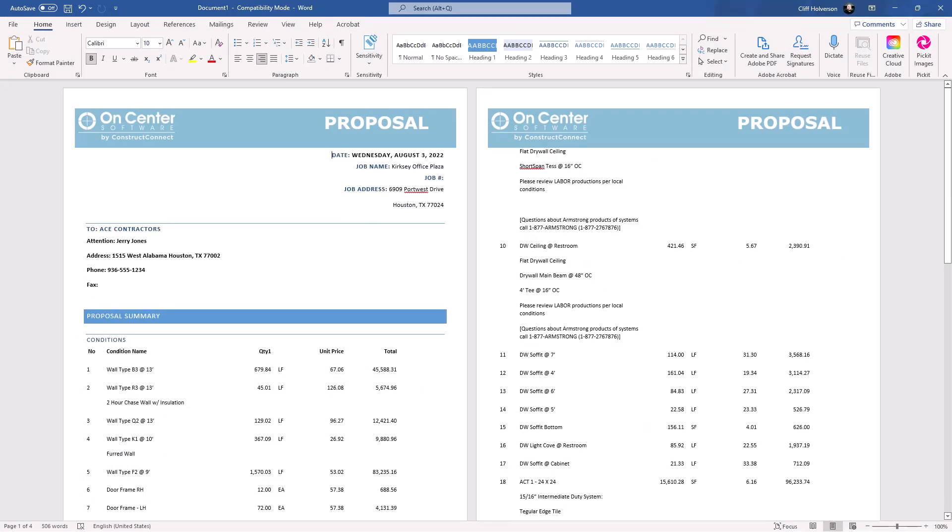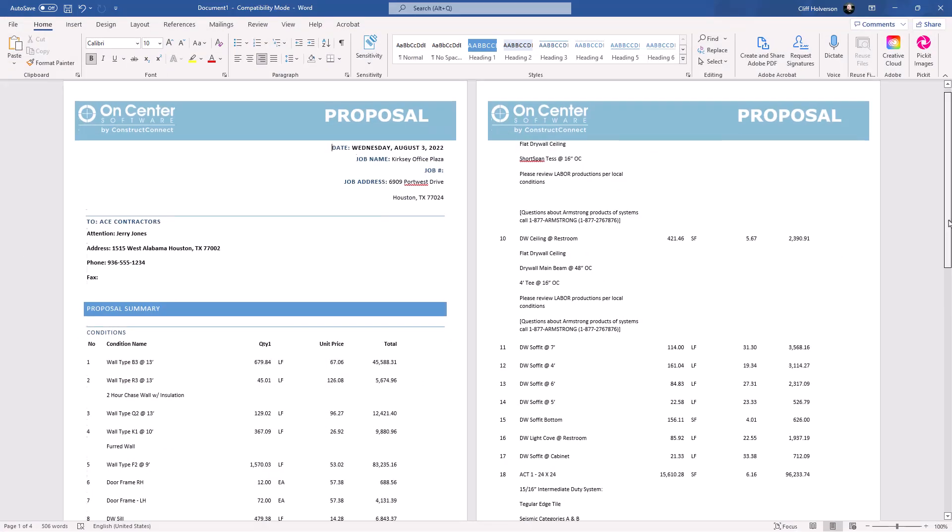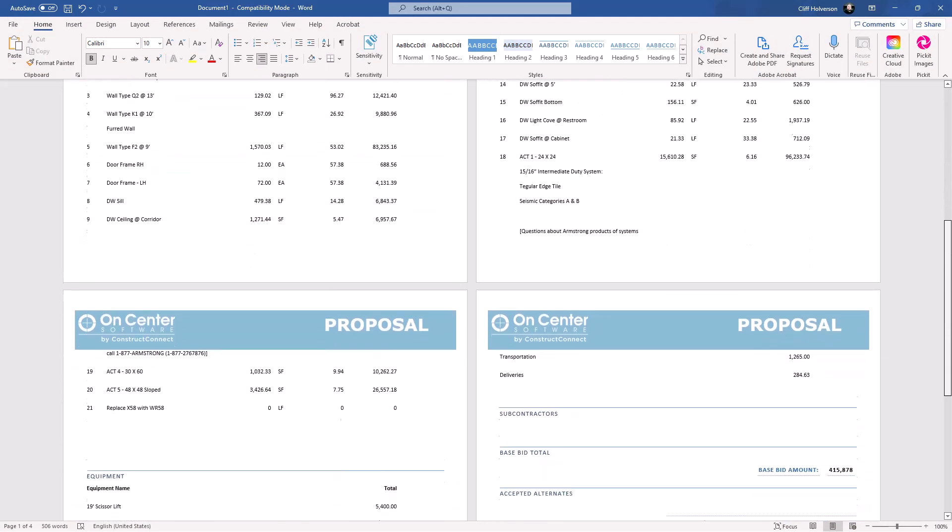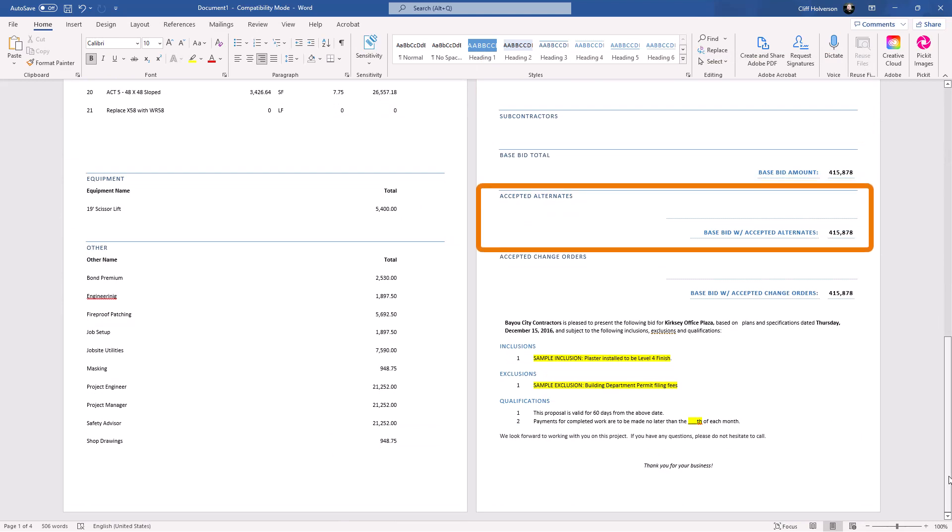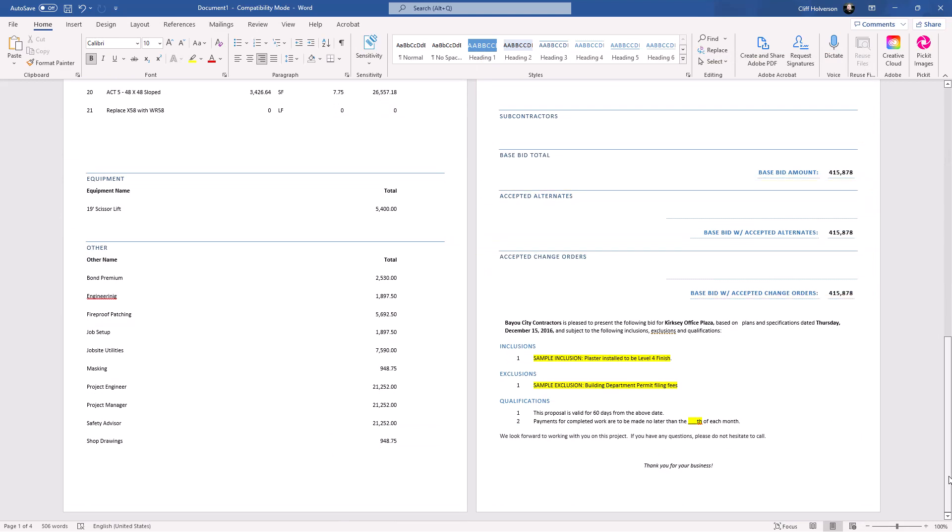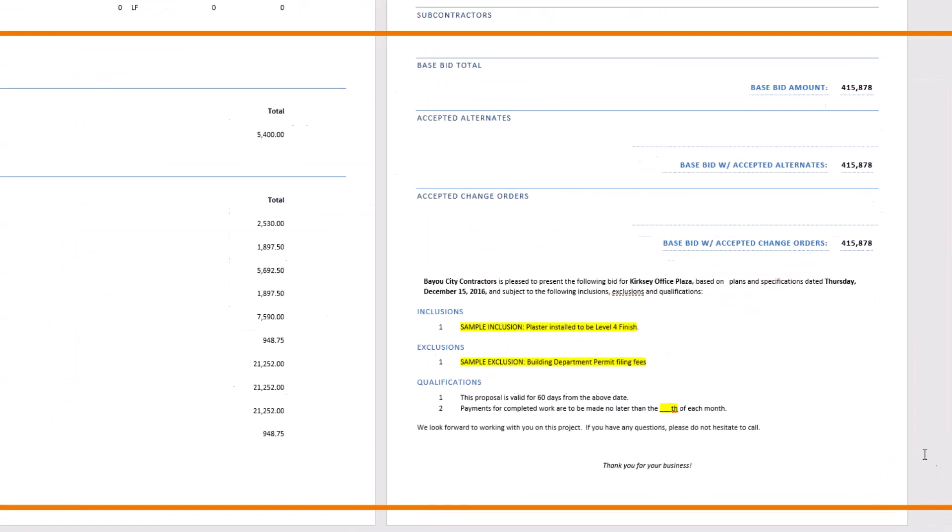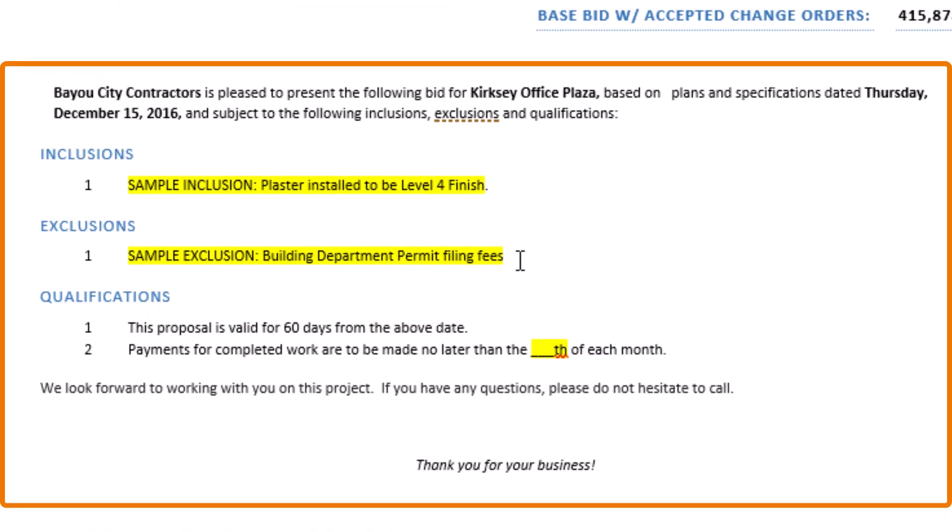Within the proposal, you can see totals for conditions or sections, as well as grand totals for the base bid, alternates, or change orders. The bottom contains sections for inclusions, exclusions, and qualifications.